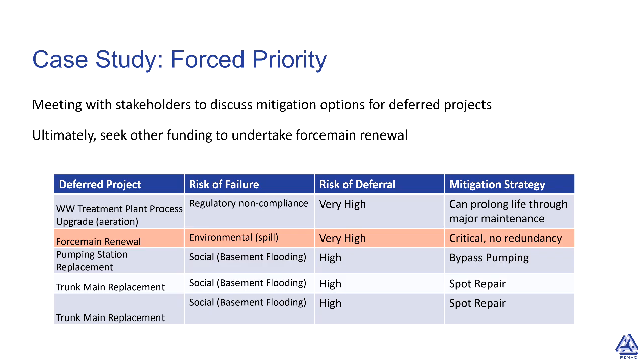But what we found is that there's some projects that are very critical that we can't just do more maintenance. We have force mains that are deteriorated, and they're quite a risk if they burst. That's a lot of wastewater flow that would go into our channels, into our environment. So we communicate that we need to do these projects, and we've backed it up with our risk model, clearly illustrating the kinds of extents and durations of risks. And ultimately what we got is some more funding from senior government.